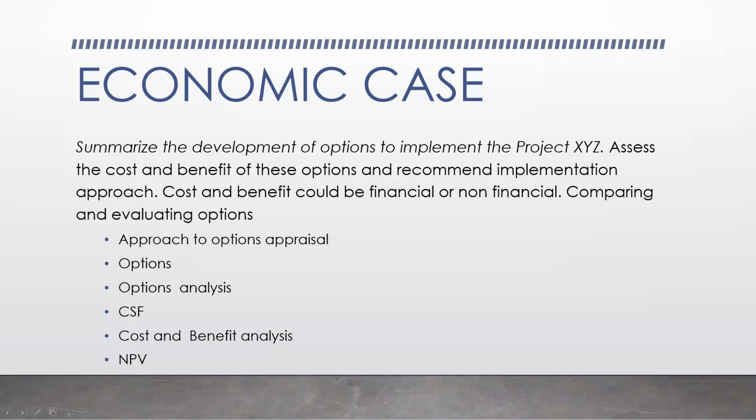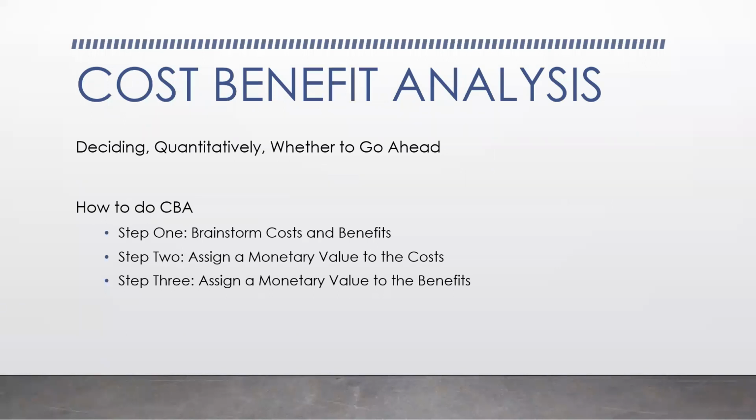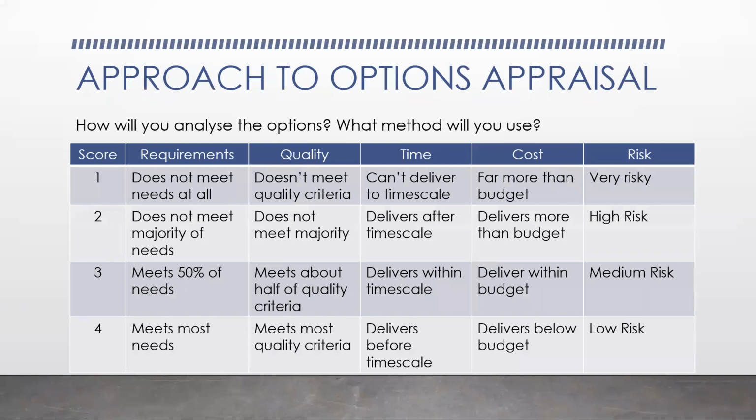Also, I've explained what cost benefit analysis is. This is just trying to guide you on how you probably want to perform your cost benefit analysis. You might want to brainstorm, assign a monetary value to your cost, and assign a monetary value to your benefits. Sometimes your benefits might not have monetary value, but try and see how you can put a monetary value to it. This is just guiding you and giving you an approach to appraising the options that you have. You may decide to use this, you might not decide to use this. This is just a guide. Not everybody uses this.